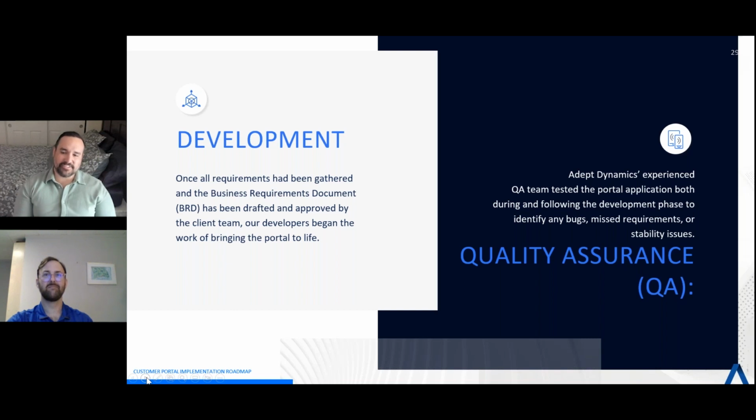As Colin's using that language again, where we got in the way of customer data, customers get in the way of their own satisfaction when they just don't have the experience to understand, why can't we just add one more page? And then complexity comes from that, and the user training requirements. And so helping them, this is what we're doing now, everything else in a bucket. Take them seriously, do the requirements gathering when it comes up, so they feel heard and they understand how that fits in a timeline. But be disciplined in being a good partner and not allowing them to expand the scope in such a way that's going to leave both parties feeling dissatisfied when you try to do too much within the original scope and budget.